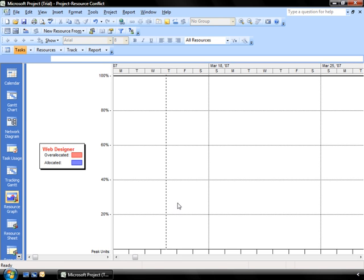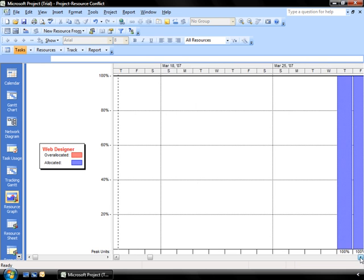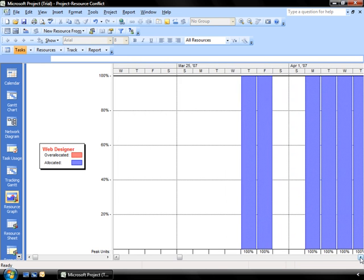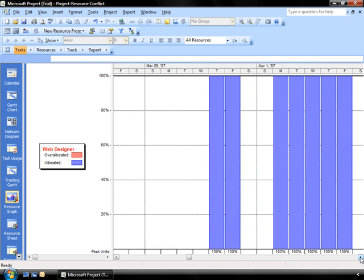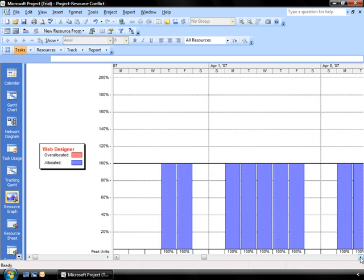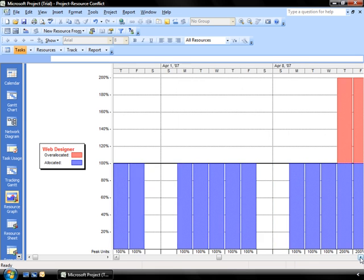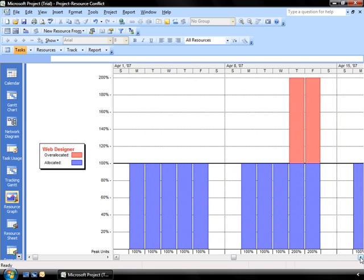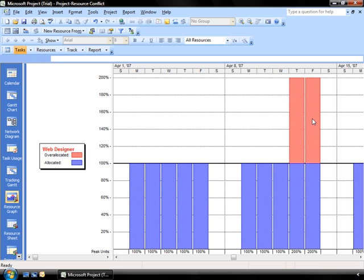And I can scroll through his calendar looking for red indicators. And I see one here the week of April the 8th. So I have over-allocated this individual on the Thursday and Friday of that week. So I know he's working 200% on those two days. Now, while I may like him to give me 200%, I can't ask him to do that going into the project. So there's one way that I can see by using my resource graph where I've over-allocated my resources.